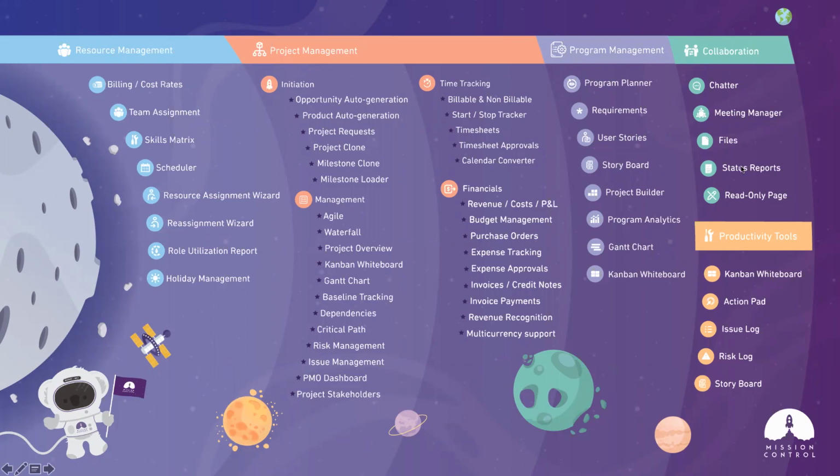We also have a weekly project status report. In that particular case, you're able to generate a weekly project status report each week. You choose the day and the time and build out key stakeholders within that project. It'll automatically send out to them. They do not need to be a licensed user of Mission Control or of Salesforce, so that could be a project update that's client facing.